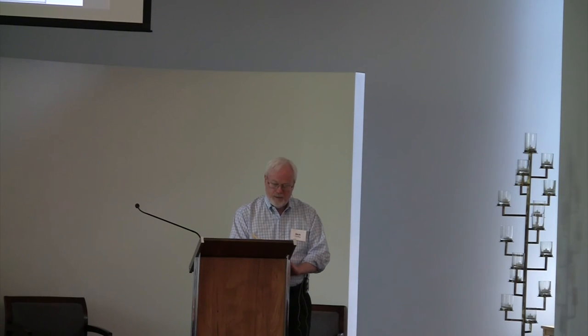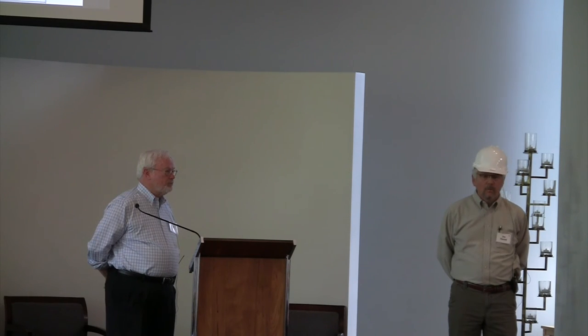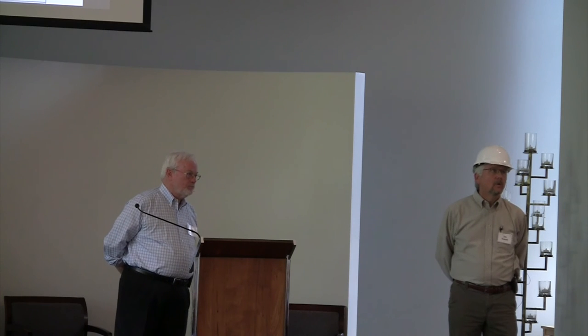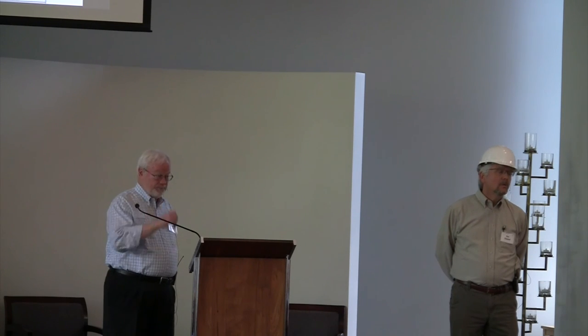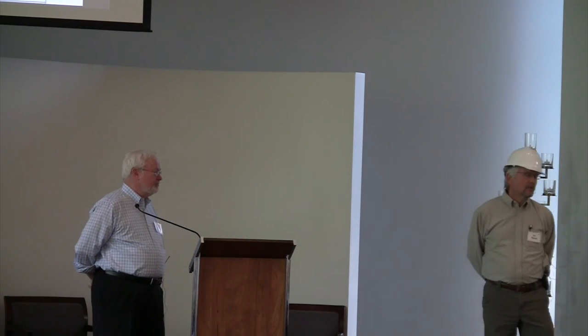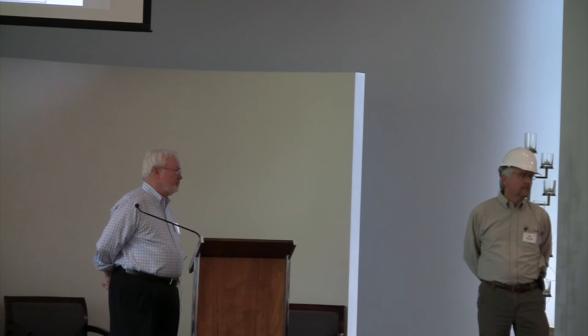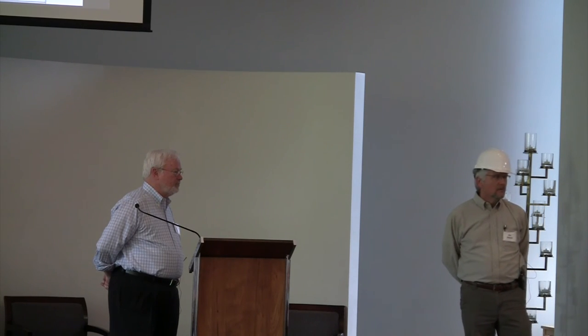I just had a quick question. It sounds like the colored door rooms, if everything goes well, should be available again when the new school year starts in the fall. But the area that won't be ready yet because of the Commons connector is the Commons. Normally the Commons is where we have the 8th grade OWL class, and it's a good location because it's off to the side and not interrupted. What is the location signed up for OWL for the fall? Well, Max, we're hoping the Commons can be done earlier too. That's not quite spelled out yet, but it's a minor part of the project as far as complexity, and it could well be done by September. We're just not sure yet. If not, we'd need to line up an appropriate alternative. We'll know that by August 1 or so. Thank you.